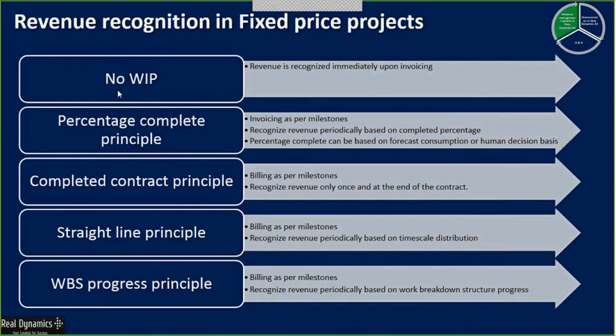So as soon as you bill the client using the on-account schedule, the revenue is recognized instantly. So you debit your customer and you credit the revenue P&L account itself, without doing any separation between invoicing and revenue recognition.